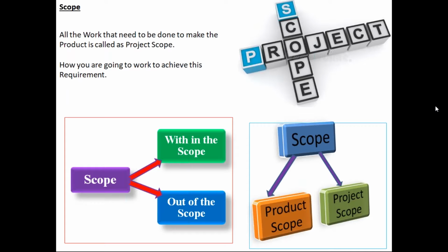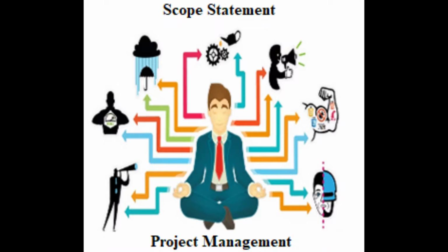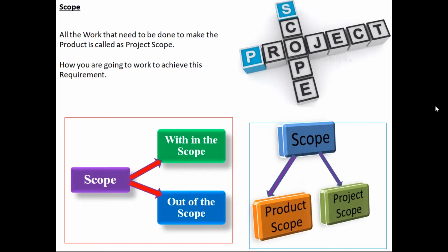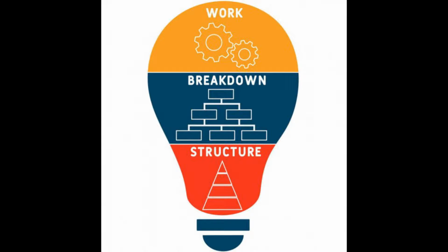The scope is defined by understanding the project requirement and the client's expectation. It is typically written by the project manager. At the beginning of the work, gather all the expectations and requirements from the stakeholders. These requirements are prioritized as per the business case and project requirement. Then understand the business case, working within the scope and eliminating out of scope. Then, based on the business case, a work breakdown structure is to be done.